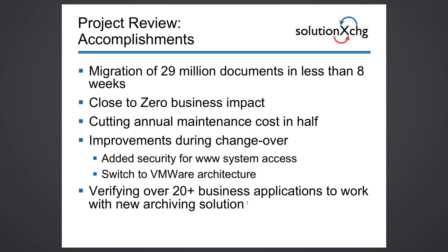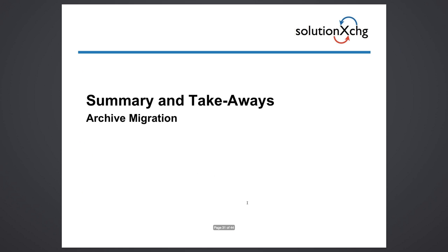That was quite an effort. And again, this taught us that it's very important that there is a clear understanding of who uses the archive and how it's used. Often that gets lost over the years. So that's something we need to make sure is handled during the preparation.